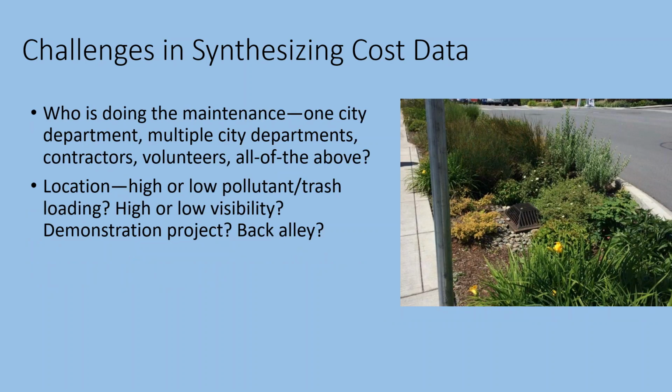Some of the other challenges that we've had when we've talked to cities is that sometimes the costs associated with maintenance are spread over multiple city departments and may include contract labor and may also include volunteer labor. And so sometimes it's hard to add up all of those different cost sources to get an overall cost for the maintenance of the BMP.